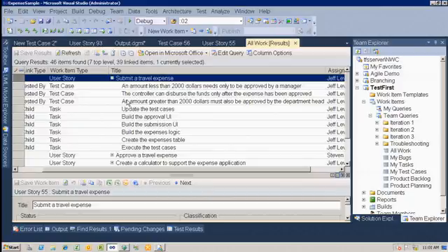In that particular case, we recommend a slight shift. And for those of you who are hardcore Scrum people, you're probably not going to like me all that much, but bear with me. I think it's better to write some test cases up front so that as the owner in your product backlog, you can write 3 test case titles. That's not that hard for somebody to put in there. The product owner can do it, but it's better to have a tester do it so they've got a little bit of foreknowledge of it.